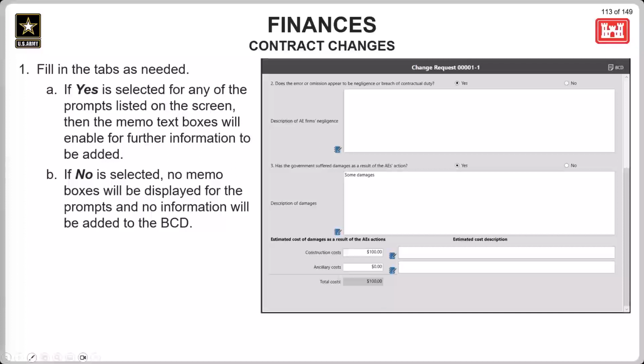In all these instances, FAR Clause 36.608 directs the KO to consider the extent to which the architect, engineer, or AE contractor may be reasonably liable and to enforce the liability and collect the amount due if the recoverable cost will exceed the administrative cost involved or is otherwise in the government's interest.